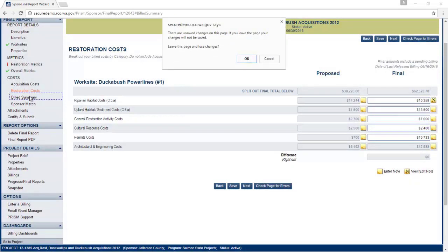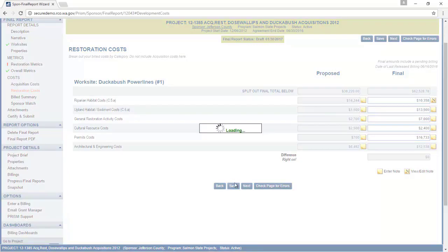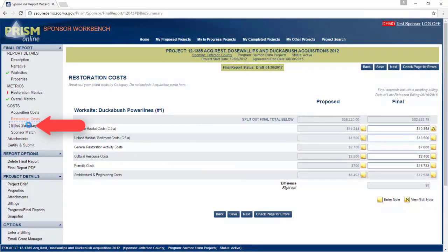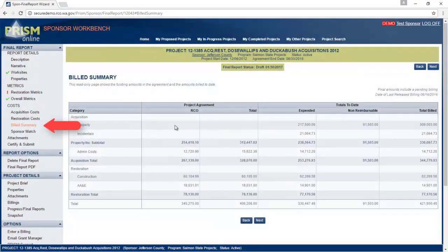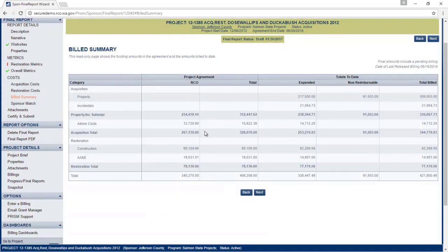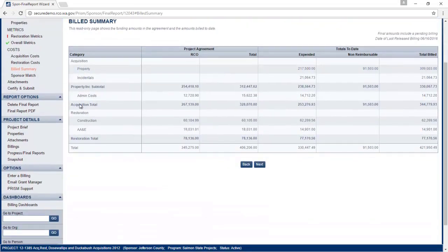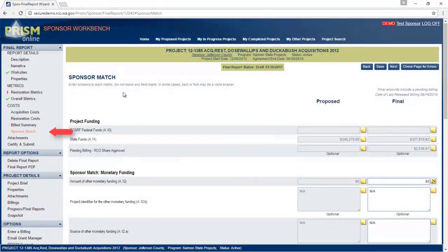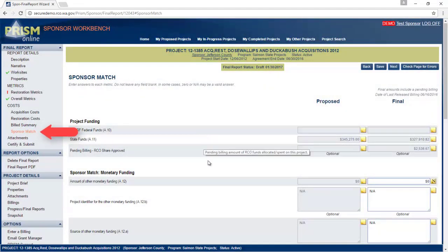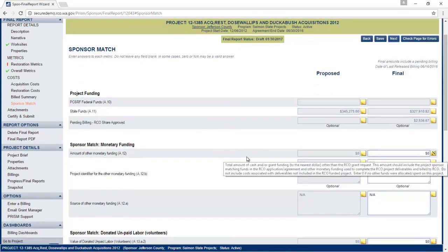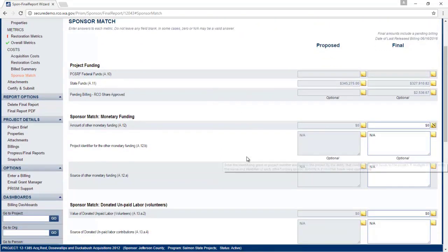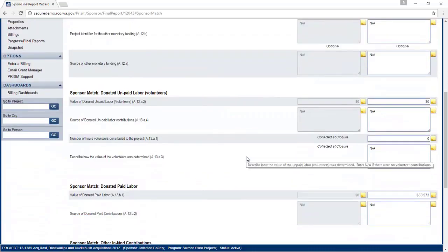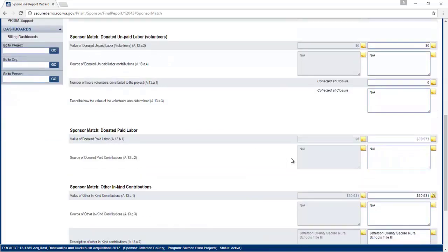The bill summary page is also read only and shows the amount in agreement. The sponsor match page, you need to complete any metrics that are on this page. For the sponsors with salmon projects, you will need to make sure that the sums of the final metrics equals to the amount you billed to RCO.